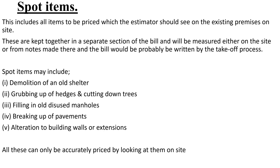The next item is spot items. Spot items are items to be priced which the estimator should see on the existing premises. This is usually before we do the construction. They are items on the construction site — for example, old shelters, hedges and trees, manholes, and breaking up pavements. All these things we need to remove, and because it will cost some extra money, they are usually written in a separate section of the bill. They are calculated either from notes that are given or when the estimator goes to site, and then the total sum is entered in the BQ as spot items.